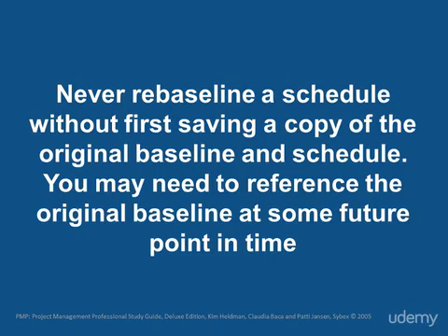This one here is probably just common sense, but we wanted to mention it anyway. According to the book Project Management Professional Study Guide Deluxe Edition, you should never rebaseline a schedule without first saving a copy of the original baseline and schedule. You may need to reference the original baseline at some future point in time. So take care when rebaselining a project schedule, because you may lose the original baseline information.